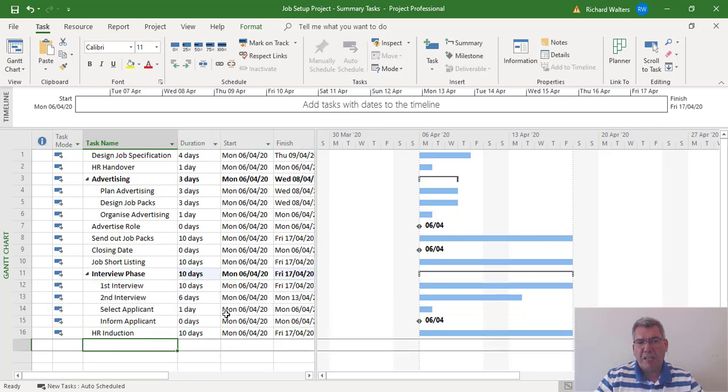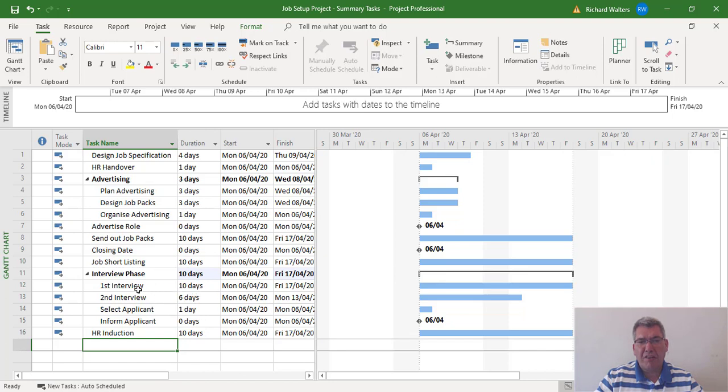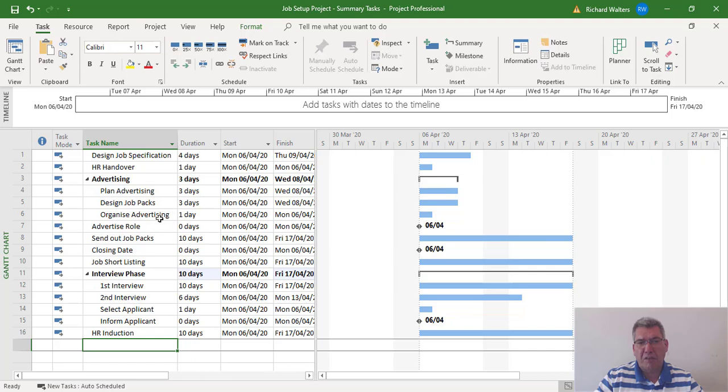when you link the tasks together, these summaries will give you different durations. If I link them and they go one after another, for example with advertising, if the tasks go one after each other—plan advertising, then design job packs, then organize advertising—that should be an accumulated total of seven days. So when you link them together, advertising will show